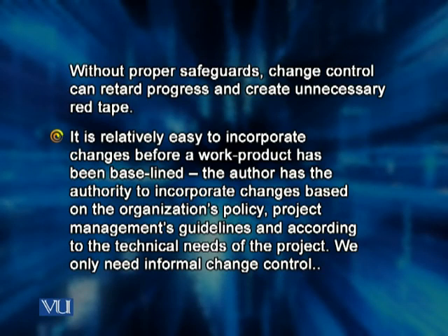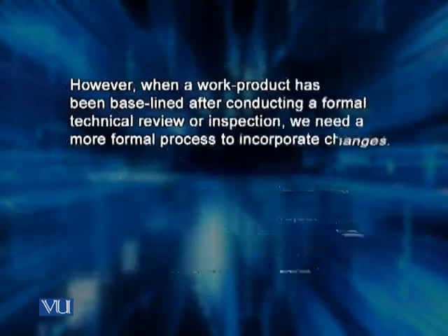These are the work products which are still under development. And in those cases, the author or the developer has the authority to incorporate changes depending on the organization's policies, project management's guidelines, and most importantly, the technical needs that have arisen because of the requirement of changes. And so we only need informal change control. This is a relatively easy scenario.